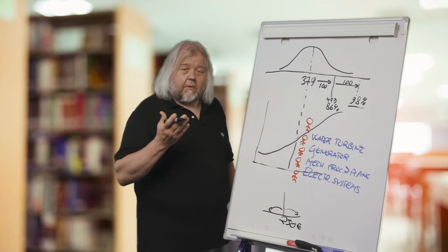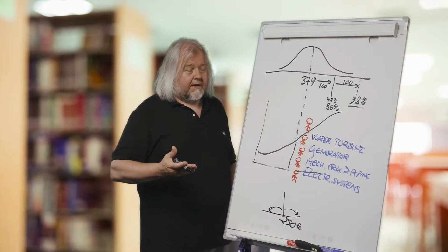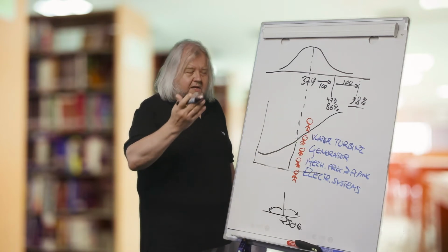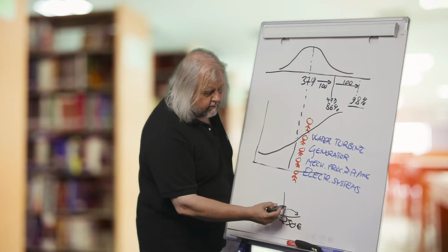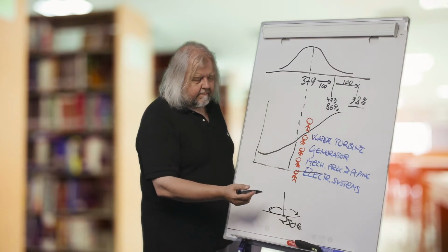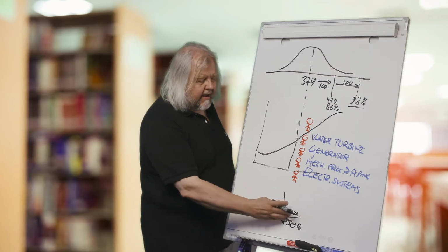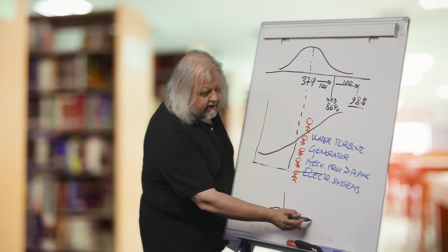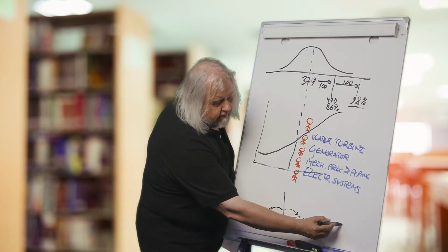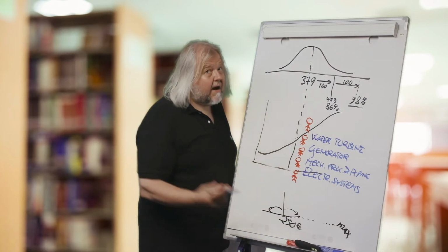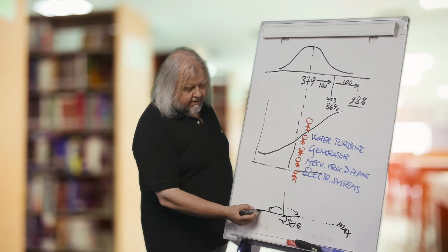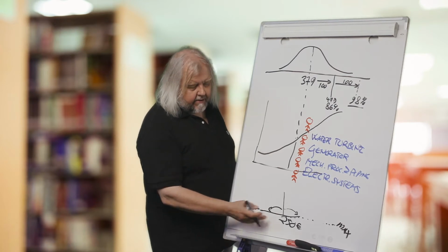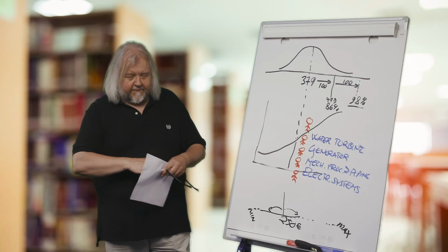And this is why, for example, facilitators are often needed for these kinds of group sessions, where the facilitator tries to persuade people to get their mind away from these kinds of anchors and overconfidence and other kinds of biases, so that we can get realistic and, let's say, big enough maximum values, and maybe small enough minimum values, so that we are not stuck only to one figure.